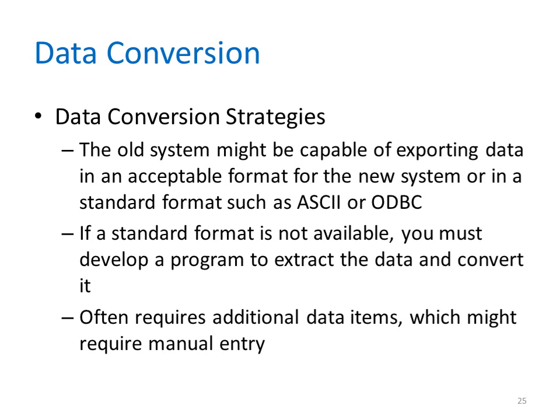Data conversion is a critical step in the process. I would caution you not to underestimate the time and difficulty that data conversion can present. During data conversion, existing data is loaded into the new system. Now, depending on the system, data conversion can be done before, during, or after the operational environment is complete. You should develop a data conversion plan as early as possible, and the conversion process should be tested when the test environment is developed.